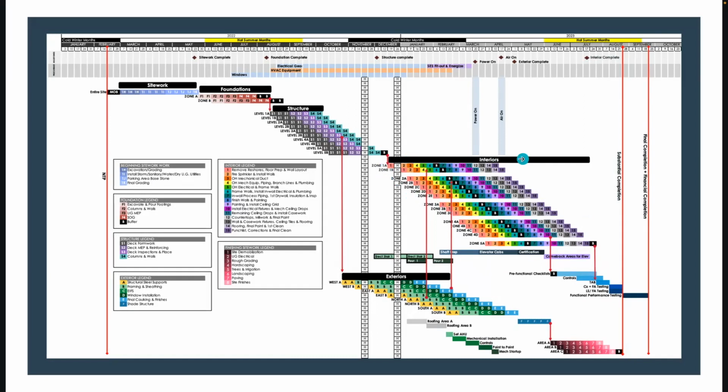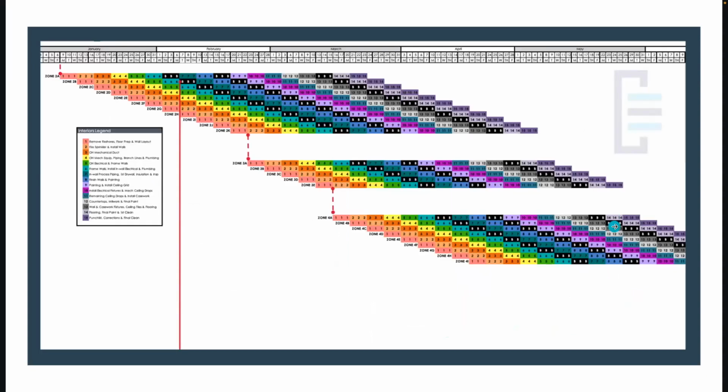When you take a phase, for instance like this interior phase, and then you take it down to the functional area where the assistant superintendents and assistant PMs run the work with the foreman, you will then see what's called a norm level schedule that's optimized, usually in a different Takt time, where the production level scheduling is derived from, which means the 6-week make-ready look-aheads, the weekly work plans, and the day plans. And so the summary of this video is that we really want to make sure that we are planning on a project level to start.